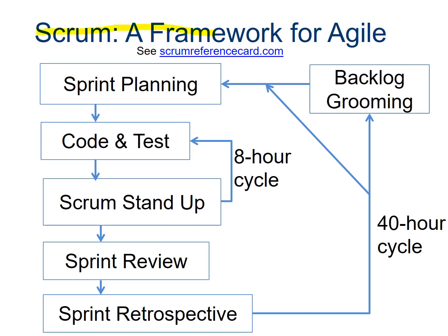Again, we're going to be using Scrum as our framework for our agile development. In industry, a sprint planning meeting would happen at the beginning of the day, and they would be planning out what they're going to do for that particular day. After the planning meeting, they would go ahead and write code and test it. At the end of the day, they would have what's called a Scrum stand-up meeting.